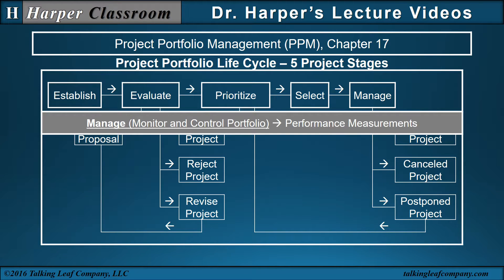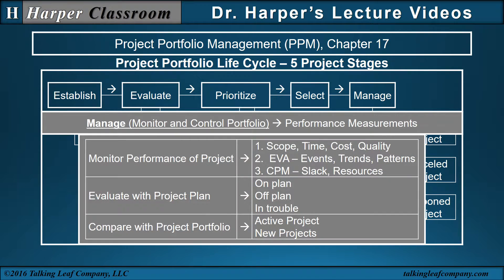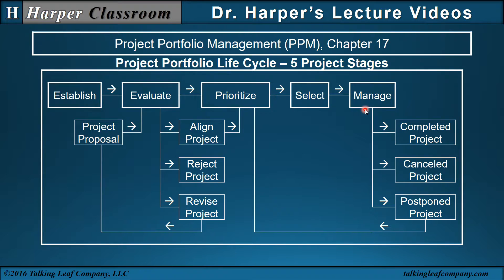Manage. Monitor and control the portfolio. Here's where we have performance measurements. We start with monitoring the performance of a project, looking at scope, time, cost, quality, and EVA analysis. We have events and the trends of the schedule performance index and cost performance index. The critical path method with the slack and resource allocations. Then we look at whether the project plan is on plan, off plan, or in trouble. Then we compare active projects with new projects within the project portfolio. The output of the manage stage is a completed project, a canceled project, or a postponed project, which goes back to the prioritize stage, where the postponed projects are prioritized with the aligned projects for input into the select stage.